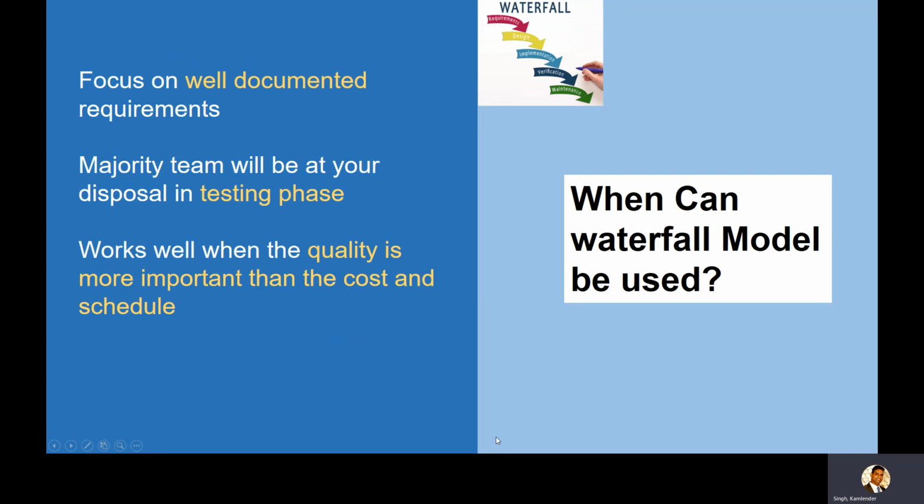Focus is on well-documented requirements. If you don't have the project scope or the requirements documented upfront, you are not getting into the next phase. So basically, again, comfortable for designers that until requirements are complete, design is not started. Comfortable for developers, until design is complete, the development is not starting. And if you see at the end of it, requirement is done, design is done, development is done.